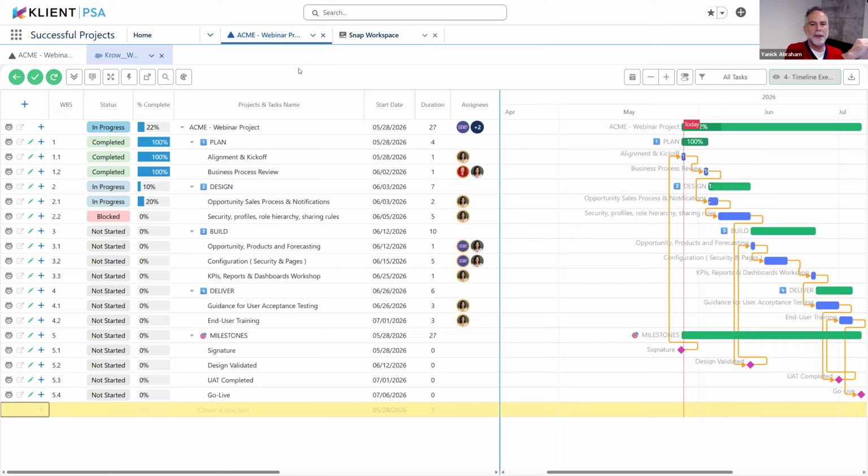But in the past, for our existing customers, the duration is one. For example, if I had a signature milestone today, the start date because of my dependency line would be tomorrow, because it would take into account a duration of one day. In this specific case, you can see my signature milestone is on the 28th of May, and that dependency is bringing that kickoff on the 28th of May as well. There's no one day duration.